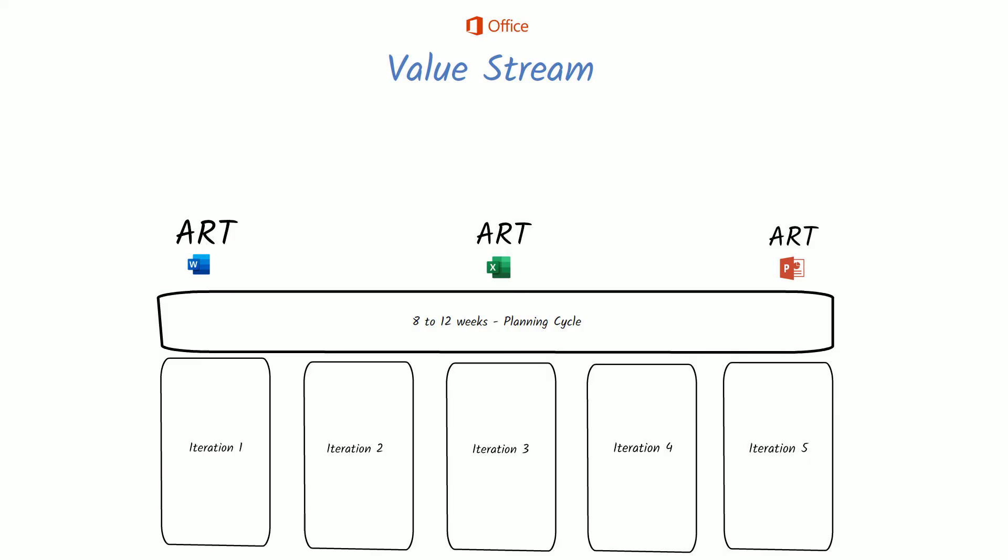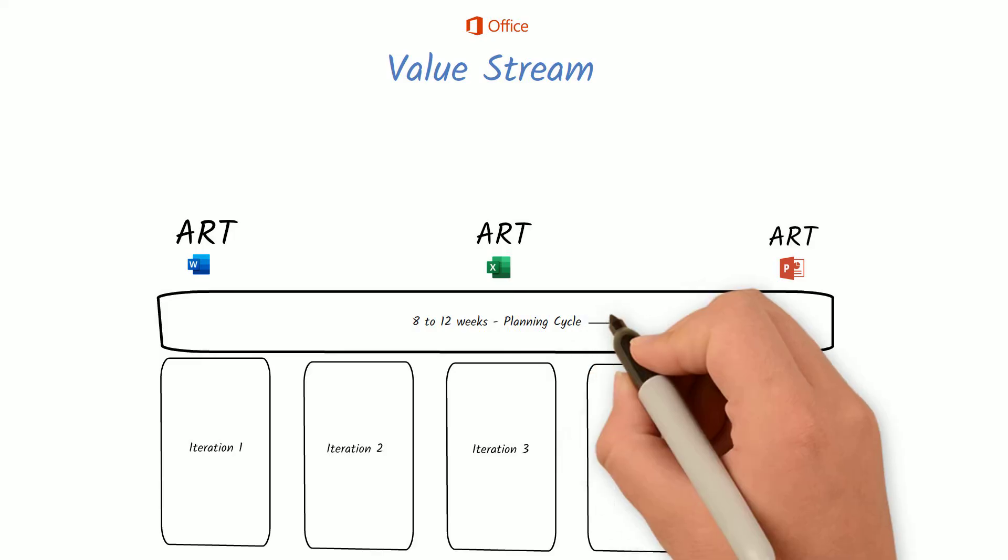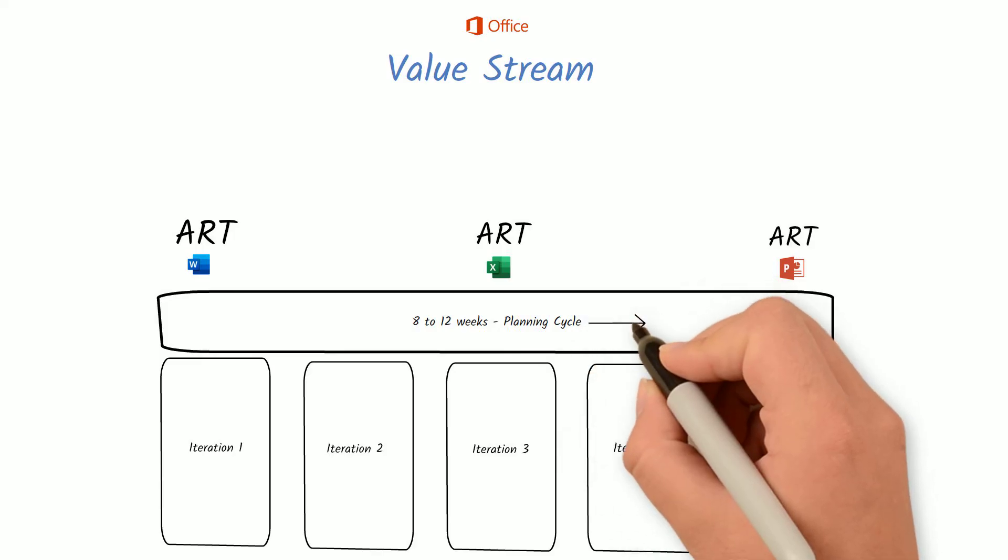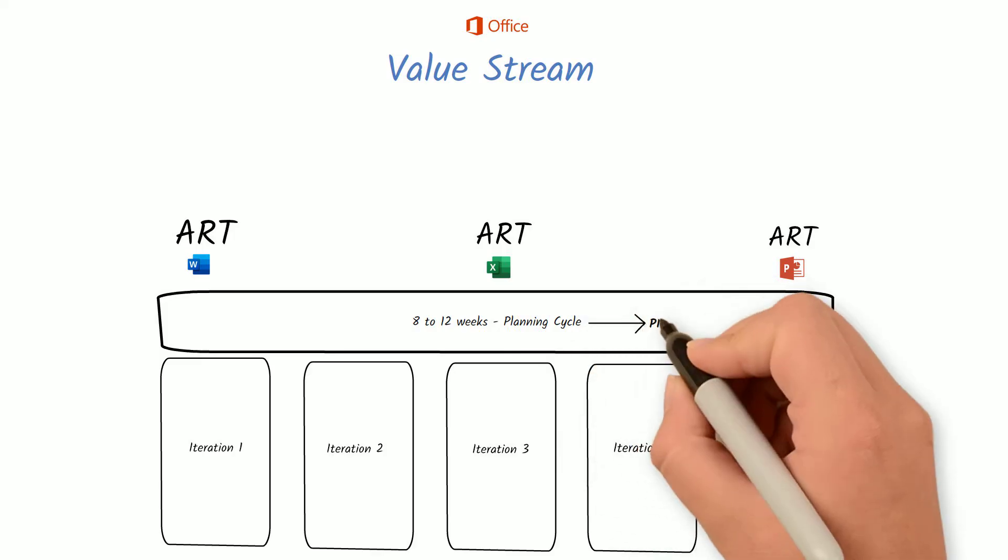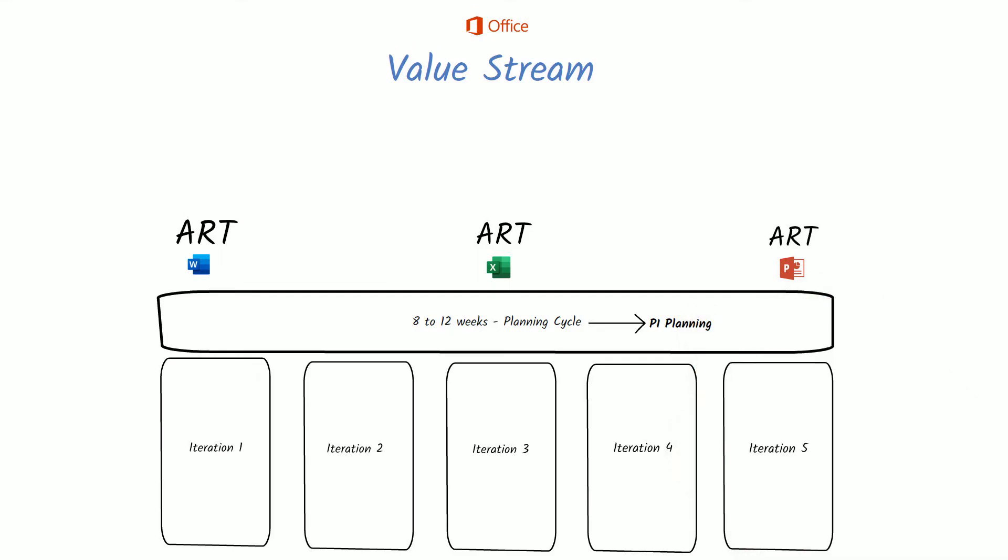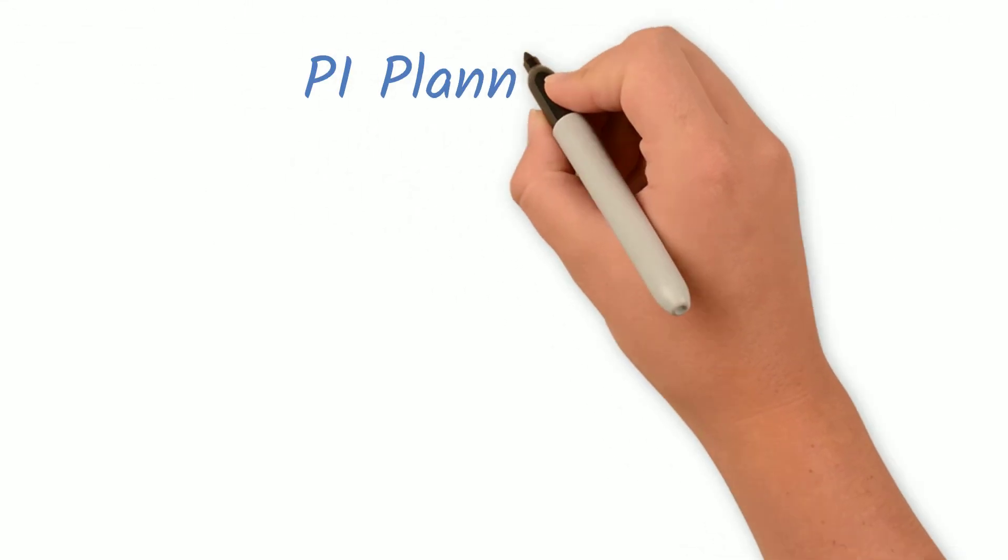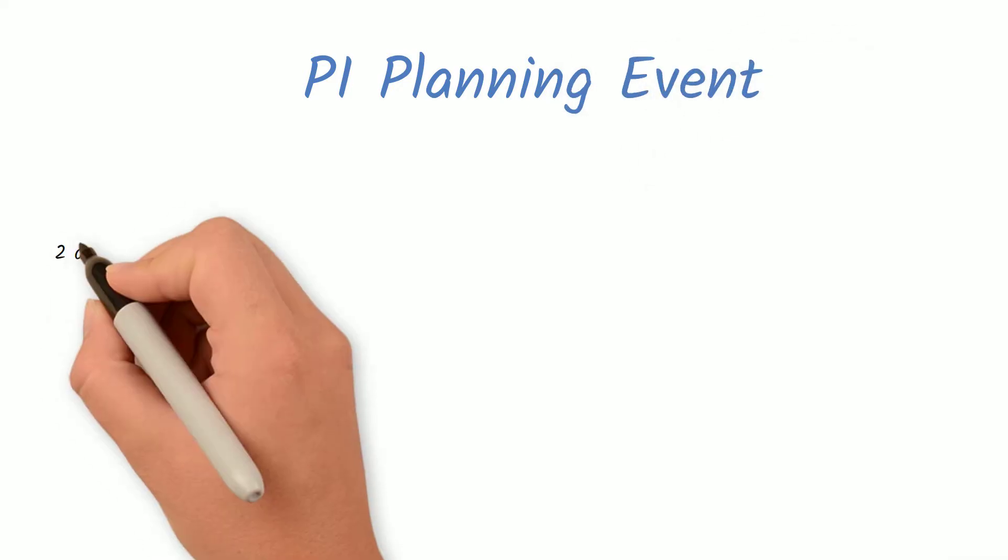The planning event that occurs every 8 to 12 weeks with each Agile Release Train is called Program Increment Planning, also known as PI Planning. Each ART has its own product backlog that should align with the overall larger vision and value stream. Each ART prioritizes its backlog before PI Planning.